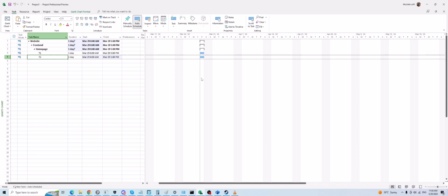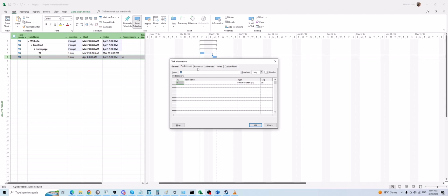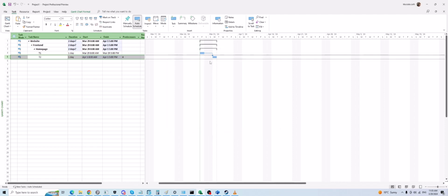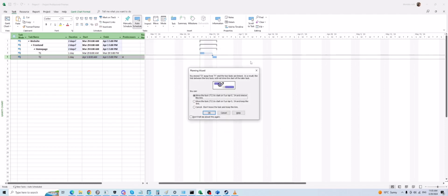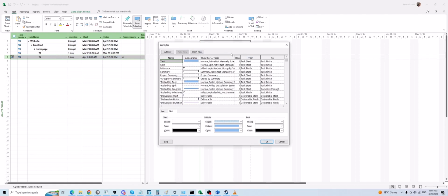On the project plan, in Microsoft Project, you always see this immediately after this one because all the tasks by default have the as soon as possible constraint. We will discuss the constraints later, but that's why you always see them here. But if it goes like this also, still the link is finish to start and this logic is valid. Okay.